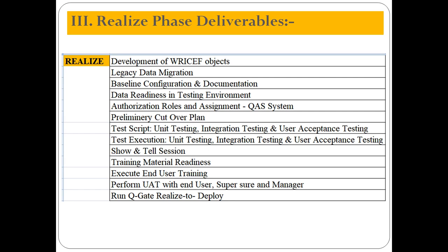The module-specific consultants have to prepare the test scripts, and we have to execute them with all the cross module consultants. Here we are going to execute in the quality system. So integration testing will be executed in the quality system with all the consultants, not the individual module consultant. The individual module consultant will execute all the business processes in the development system, that is unit testing.